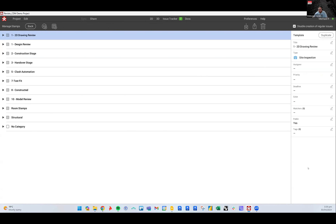Question from Yolanda: will it be possible to edit the status of a clash list coming from Navisworks? That has been raised in a few tickets since 5.14 was released. The answer is no — Navisworks clashes have their own clash type which can't be modified inside Revisto. If it makes more sense to run clashes within Revisto, that might be the easier path.